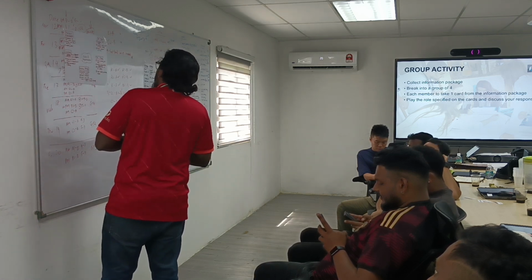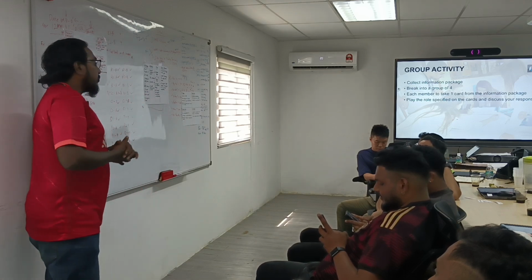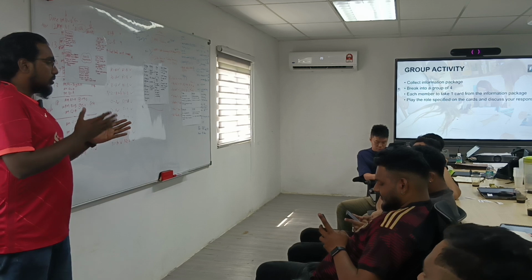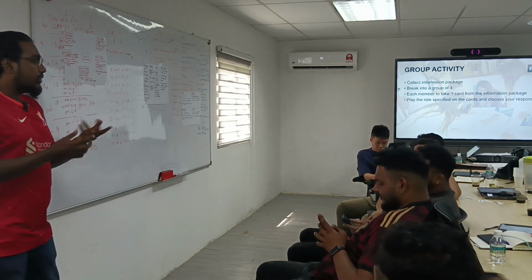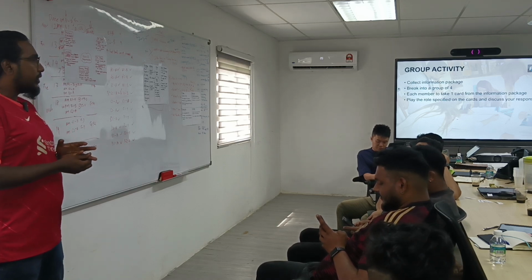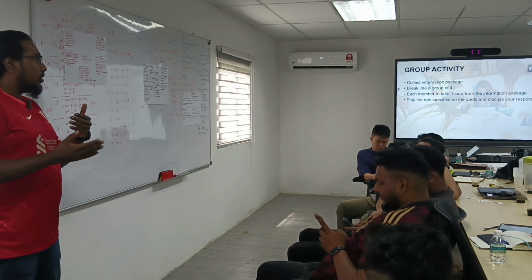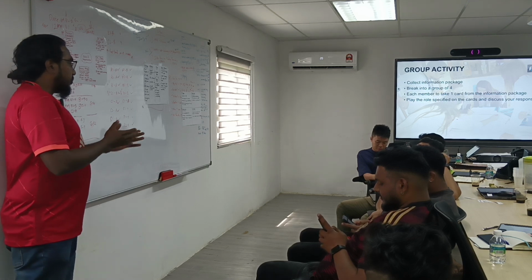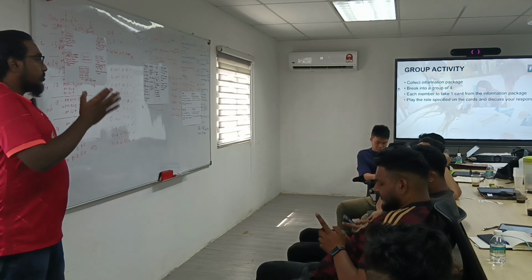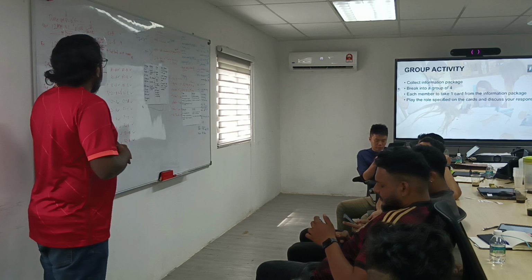TNC manager also will create planning for their TNC team. They need to do a look-ahead, because for TNC there is CX level 3, 3.5, 4, and then IST. All of these need to be planned ahead before we go into it, because there will be a lot of trades. So TNC manager has to organize it properly and assign it to their TNC engineers to proceed with the planning.